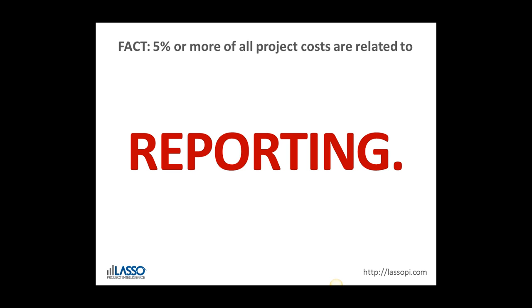We've had a lot of customers complete a survey, and in talking with our customers face-to-face, we always ask this question: how much of your costs on a typical project are related to reporting? Usually we've seen answers anywhere from 2% to 10%. We've seen as high as 10% of the overall cost of a project is related to reporting. That is everything from gathering the data, analyzing the data, formatting it, sending it back and forth, and then redoing that when it's not exactly what you wanted. So there's a huge opportunity here.